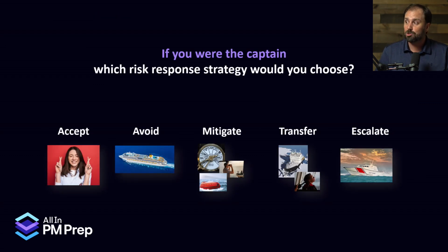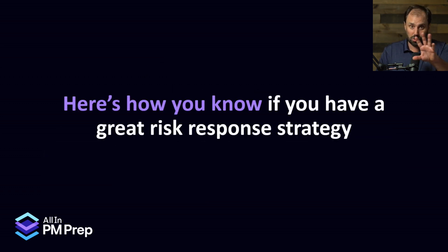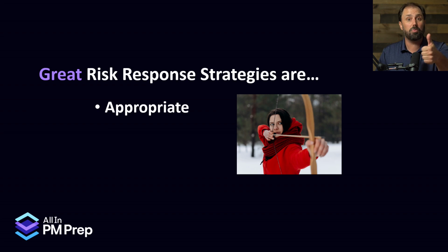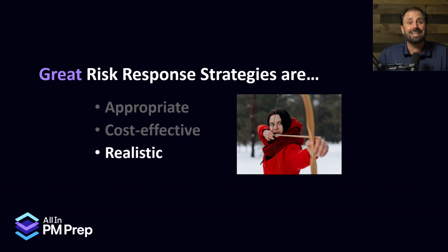So, as we're laying down those 5 strategies, if you were the captain, which response would you choose? Well, let me help you. Now, there's a way to know if your risk response strategy is really, really good. And great risk response strategies are, number 1, they're appropriate for the scenario. Number 2, they're cost effective. And number 3, they're realistic.